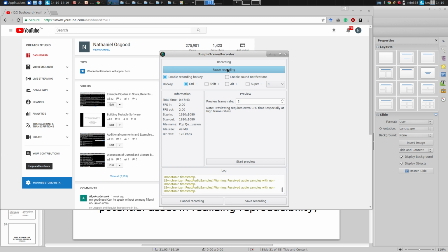After all, you are investing up front. You're investing up front in clarity of a plan and communicating that, so that people know if this happens, if the build master gets sick, who's going to take over? If someone drops the class, who's the developer? We'll switch someone from the test team to be half test, half dev, or whatever. If the project manager gets ill, we'll ask someone to handle that situation. So there is some investment up front.